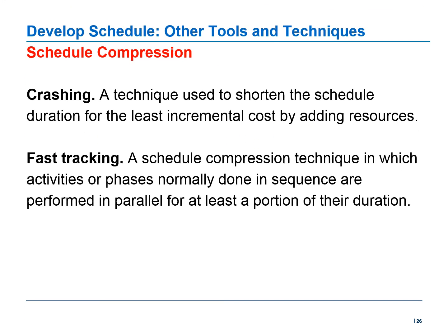Now let's have a look at another technique to create the schedule or develop the schedule. That is schedule compression. Schedule compression techniques are used to shorten or accelerate the schedule duration without reducing the project scope in order to meet schedule constraints, imposed dates, or other schedule objectives.